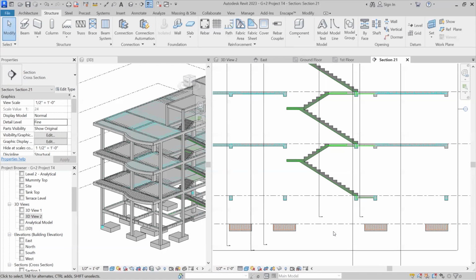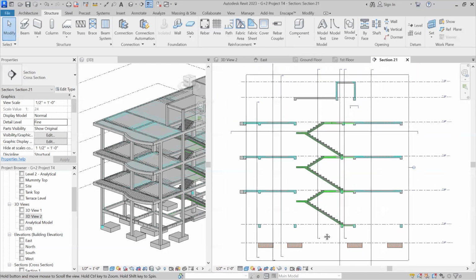Without passing the plan, you won't be able to go for it. Even if you go for designing or constructing the building, the Nagar Nigam people will visit. They get information from their sources. They will visit within 1 to 2 months. You will see that they will visit your site and apply some taxes on you, if you have not taken their permission for drawing and constructing this building.